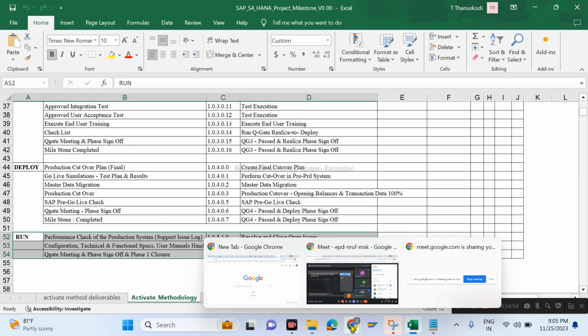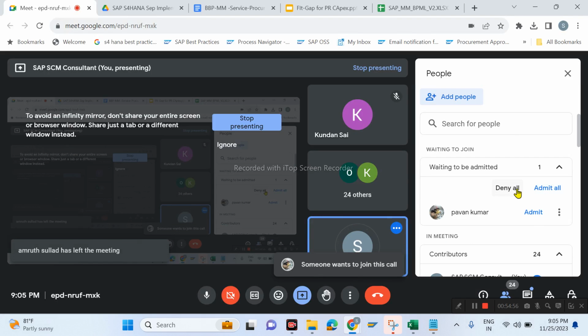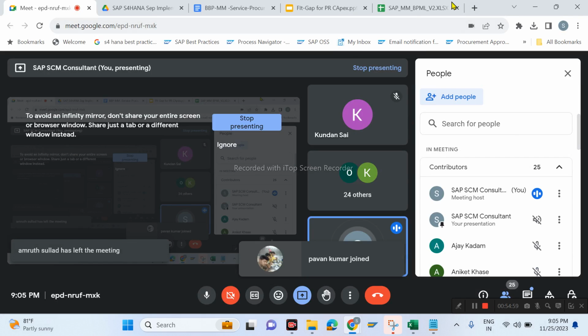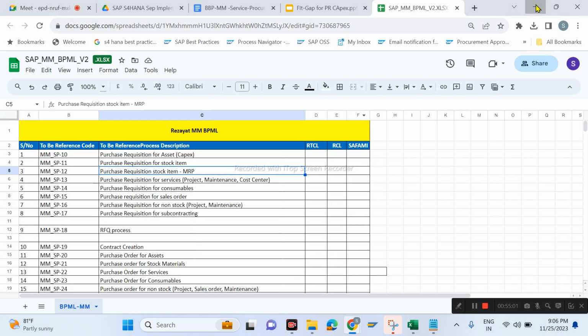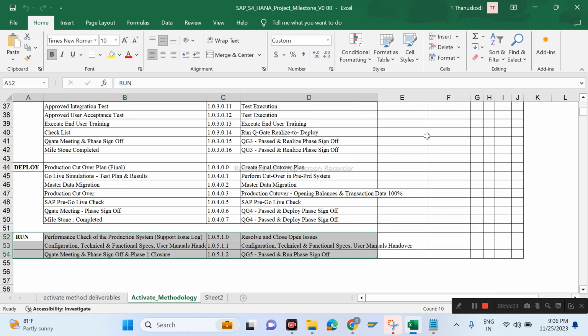So now all the master data is uploaded, right? The material master, customer master, vendor master, asset master, and all the opening balances are uploaded, as well as the production master, production orders, customer sales orders and purchase orders. From the cutover activities point of view we have uploaded everything. So next, they have to punch the transactions. Now we have to make a go live.